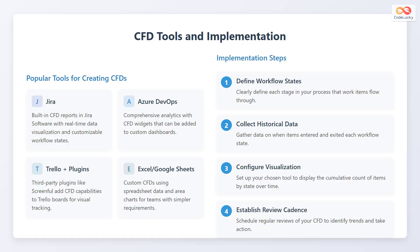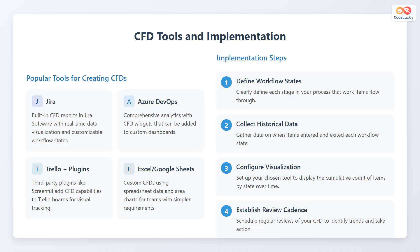Let's see the tools for implementing cumulative flow diagrams. Some popular tools for creating CFDs are Jira, which has built-in CFD reports with real-time data visualization and customizable workflow states. Next is Azure DevOps, which has comprehensive analytics with CFD widgets that can be added to custom dashboards. Trello Plus Plugins uses third-party plugins that add CFD capabilities to Trello boards for visual tracking. Excel or Google Sheets can be used to create custom CFDs using spreadsheet data and area charts for teams with simpler requirements.